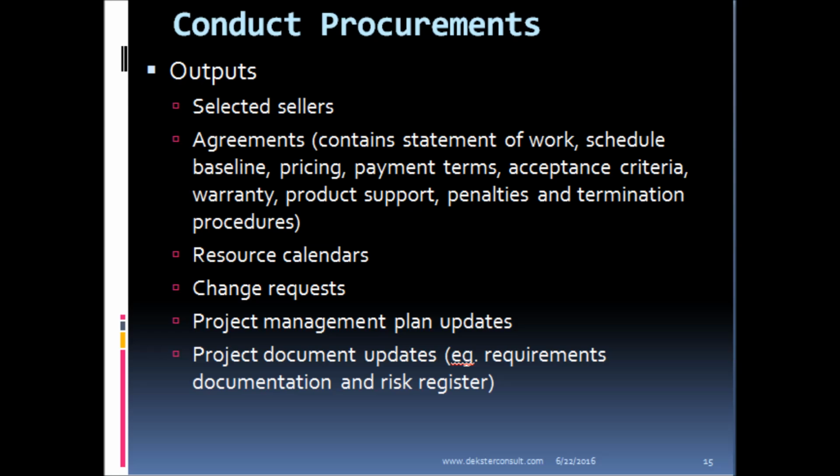Outputs. We will arrive at the list of our selected sellers or a seller, and then we will enter into agreements with them. And let's remember, our agreements must contain a statement of work, schedule, baseline pricing, payment terms, acceptance criteria, warranty, product support, penalties, and termination procedures. Then we will develop a resource calendar showing when resources will be available to work on our project.